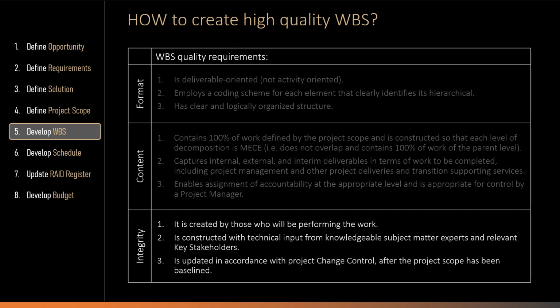When it comes to WBS information sourcing and maintenance, it shall be created by people who will be performing the work because they know it best. It shall be developed with input from technical experts and key stakeholders, and shall be maintained under change control once the project scope is baselined.